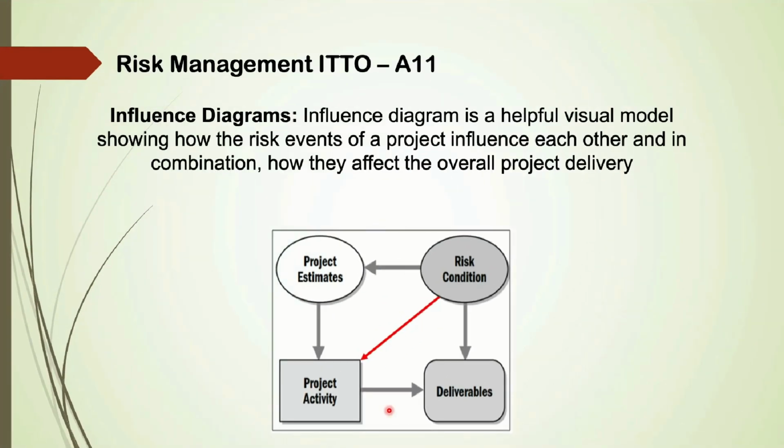Answer: influence diagrams. Influence diagram is a helpful visual model showing how the risk events of a project influence each other and in combination how they affect the overall project delivery. I have included a picture of an influence diagram in the slide.